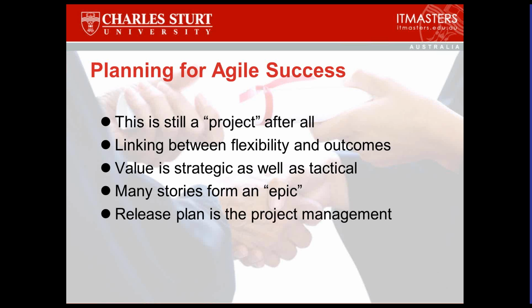So the release plan is the plan that takes all that into account. It's the release plan that says, okay, well, if we, over 3 iterations, focus on delivering these pieces, these user stories, these pieces of functionality, then at the end of it, we will have a large epic and we'll call it customer expenditure reporting. And we'll tie a bow on it and call it done.